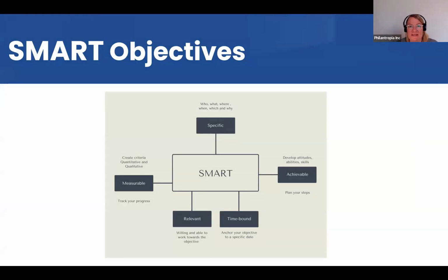So be super specific, because objectives are something you describe in your project proposal, and you need to be able to achieve those. If they are not SMART, it's super difficult to say in the end whether you've achieved them or not. It's very difficult to determine this if you don't formulate them as SMART objectives. So that's why this is so important.